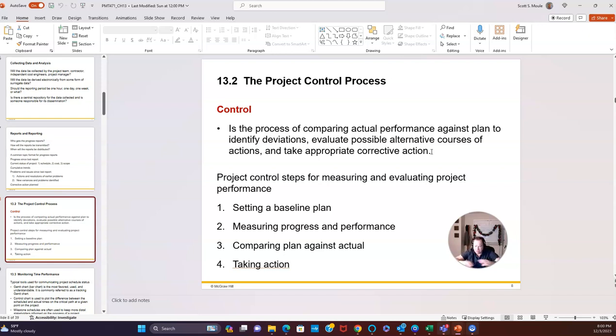You build it into a Gantt chart, and the first thing you do is create your baseline. At the very beginning of a project, this is exactly what you planned. This project will take 12 months. It requires these people with these skills. You're going to deliver these capabilities at various times throughout the 12 months. And here's how you're progressing.